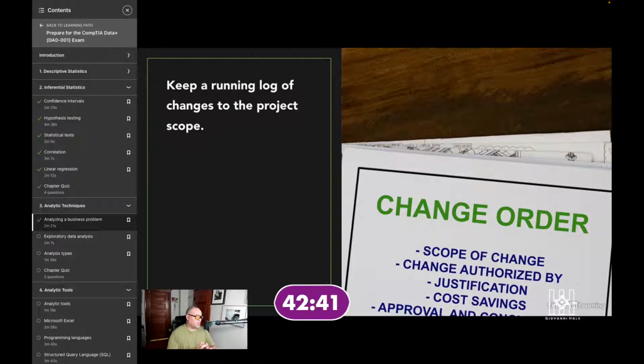It's a good idea to maintain your requirements document as you go about your work. Use the document to track new issues that impact your project timeline and management too, adjustments to the project scope or order of deliverables. A running log identifying any scope changes is a valuable aid that can help you make sure you deliver your analysis accurately and on time. It can also help you after your work is complete as you reflect on what went well and what would make future projects more successful.